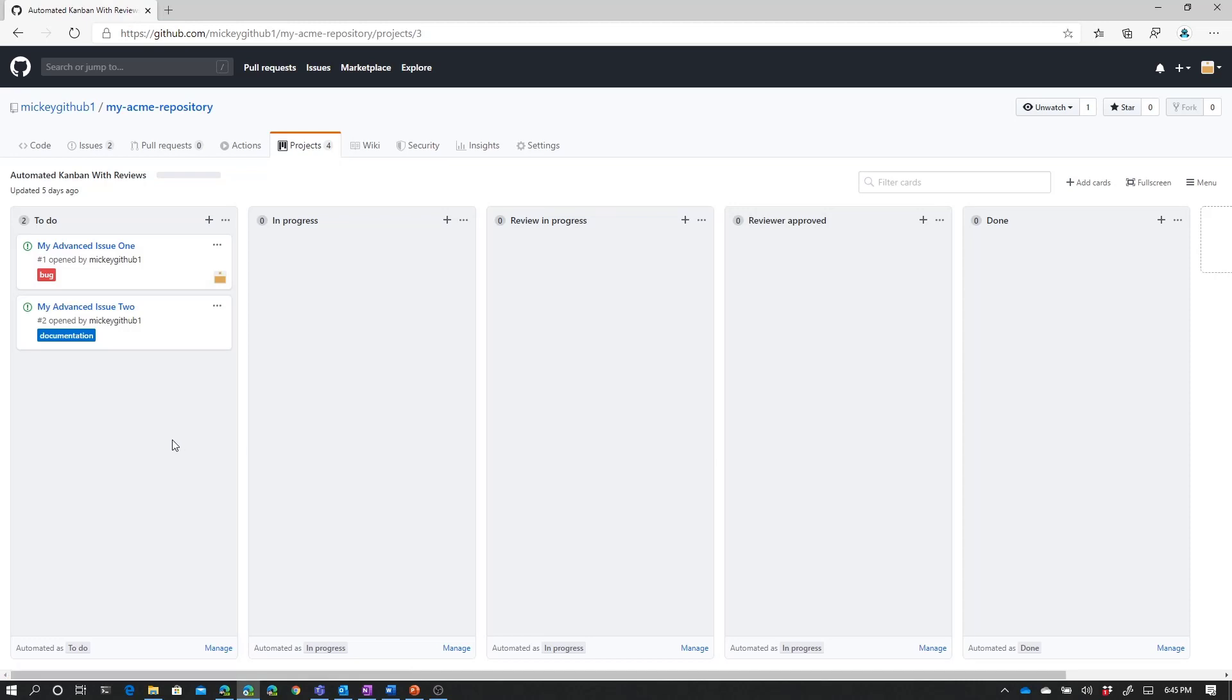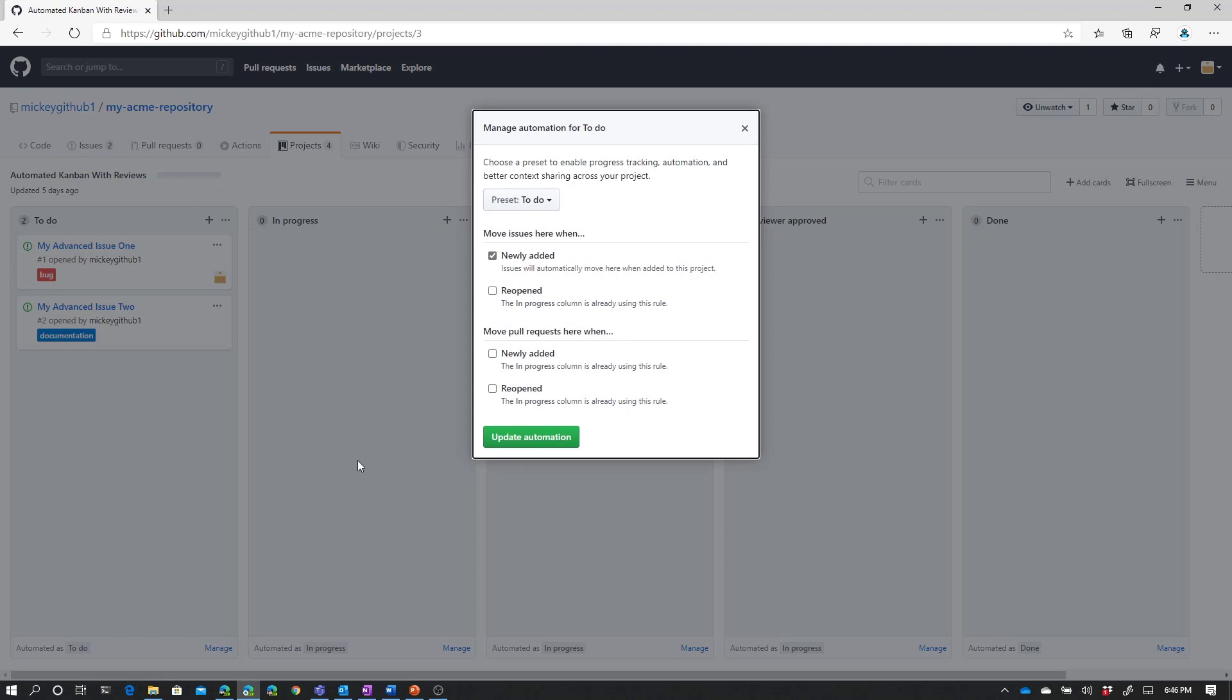And just as we could with the other board, we could drag and drop cards to different columns. We could use keyboard shortcuts to move cards to different columns. But since we have automation turned on, we can also use automation to help us move things to different columns. Now, if we open up the automation in the to-do column, we saw this in the previous video. When we added new issues to this board, they automatically showed up in the to-do column because we have the automation set that way.